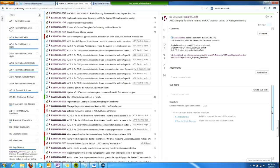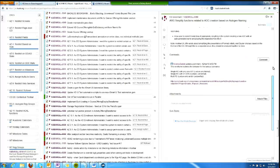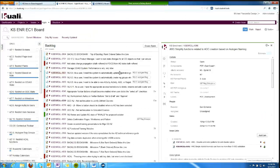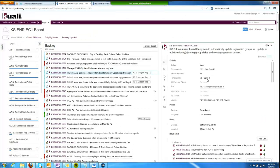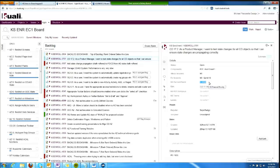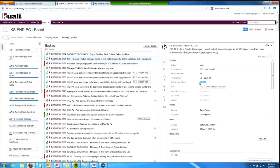That's viewing a backlog. I can click a ticket and see detailed information about it. I can see information about a prioritization category that the product owners and I initially use to get an initial understanding of priority, but positioning in the backlog always trumps a value set here because we don't typically update this once we've rank-ordered it.